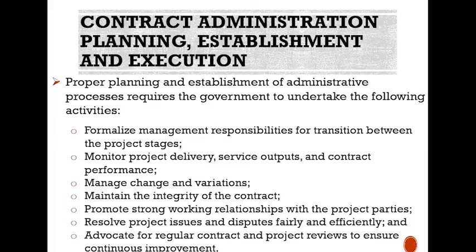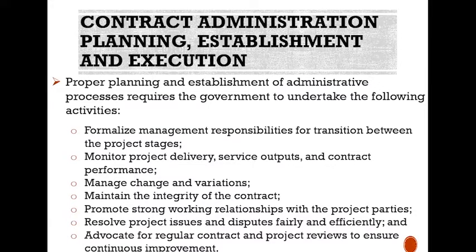Contract administration: planning, establishment, and execution. Proper planning and establishment of administrative processes requires the government to undertake the following activities: formalize management responsibilities for transition between project stages, monitor project delivery, service outputs, and contract performance, manage change and variations, maintain the integrity of the contract, promote strong working relationships with the project parties, resolve project issues and disputes fairly and efficiently, and advocate for regular contract and project reviews to ensure continuous improvement.